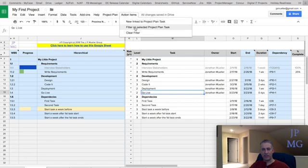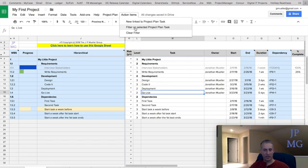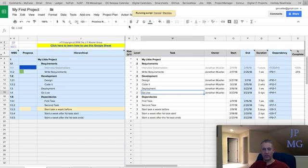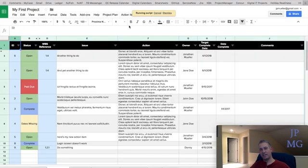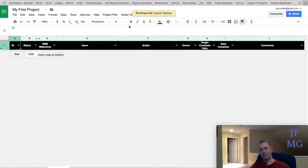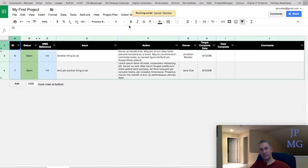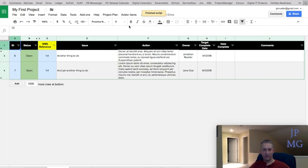Let's go check it out or any action items. So we do action items and we'll say filter on the selected project plan task. So basically it's saying go find any project action items related to this task, which is WBS 1.4, right? So 1.4 here. So let's go filter on this. And it's going to take us to the action items tab where it's going to quickly sort and filter on 1.4.